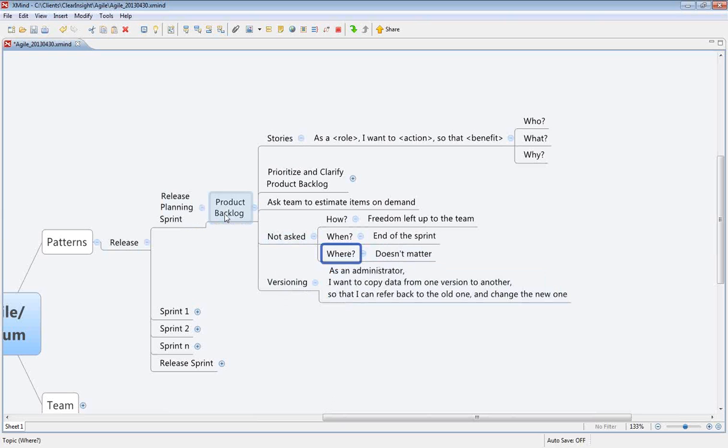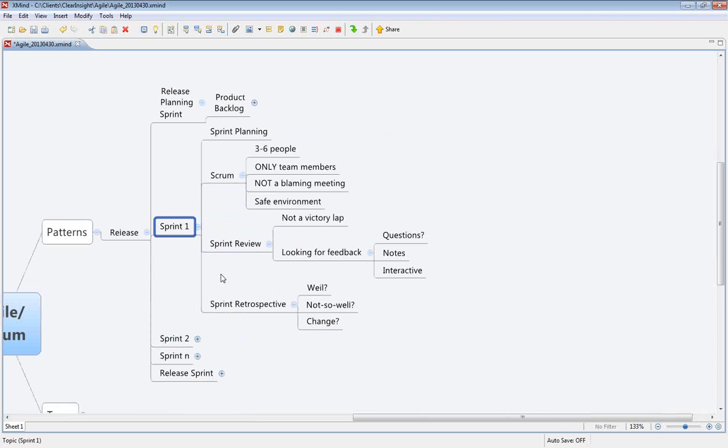So let's backtrack a bit here. Let's say we've got our product backlog, and this is a list of our stories to get done. And now we're getting into a sprint. So you'll see a sprint falls into this kind of a pattern where we'll plan, and as a team, we agree, yep, this is reasonable. We can get these stories done in this sprint. Okay, yep, high five, we're all good to go, great.